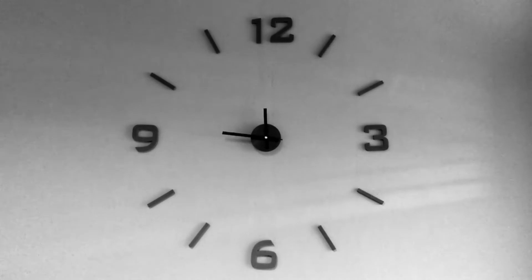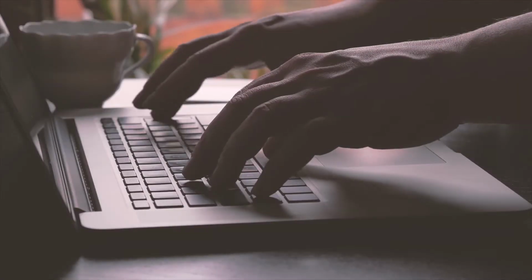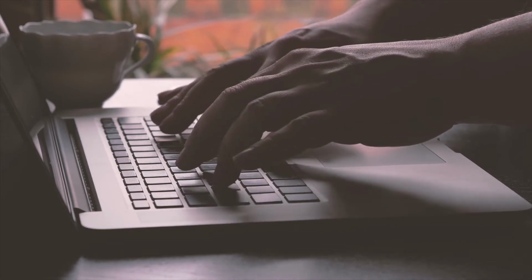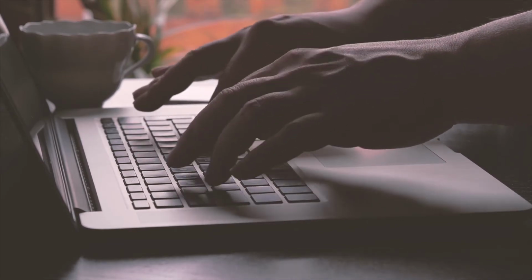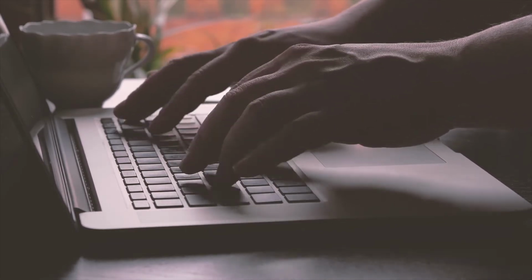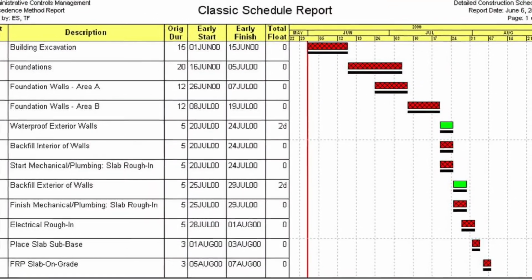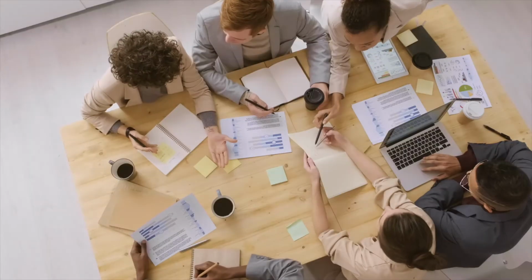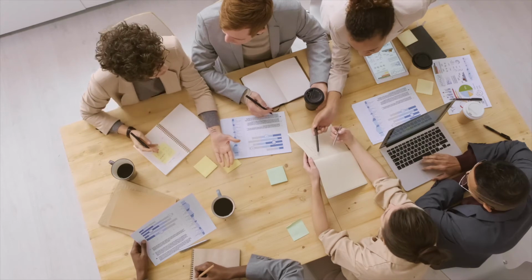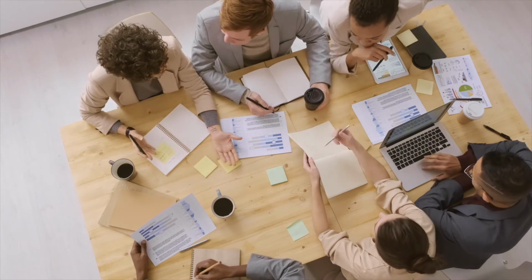It is also not a good idea to organize a WBS in phases. It is okay to think in terms of chronological order when deconstructing the scope, but the inputs of time should be during the scheduling portion of planning or when developing the network diagram or Gantt chart. Putting the attention on schedule when the focus should be on WBS and scope can make you miss portions of that scope.